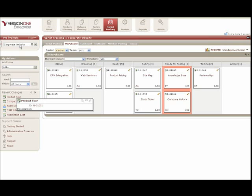A lot of Kanban teams just kind of abandon estimates altogether and have this thing called the 'yes-timate' — yeah, we can get it done. Because you'll have a two-pointer, a three-pointer, a one-pointer in one particular state but your limit is three, so you haven't violated that but you have variable items there. So one thing to consider if you're going the Kanban route is just get rid of estimates altogether and get things down to similar size. We're really dealing with count of items because we're trying to manage our attention and not multitask — we're trying to complete things one step at a time.